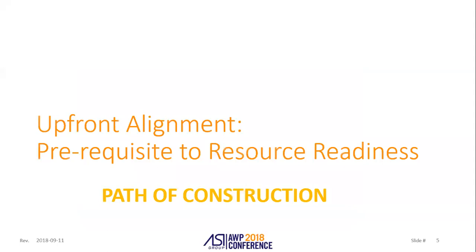When you talk about resource readiness, it's all centered around the path of construction. For a true AWP implementation you need a very strong path of construction, supported by engineering readiness, material readiness, on-site readiness, and finally you need the people using it to be in the right mindset. It really starts with upfront alignment in the front end of the project, and we consider that a prerequisite to all our resource readiness.